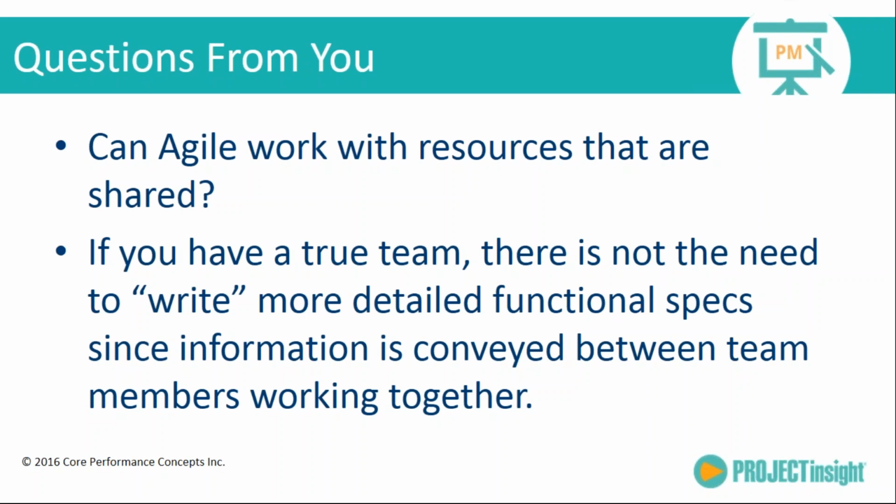it is important to document afterwards when you come up with a solution what that solution was. And there's a couple main reasons for that, because we need to be able to train. So people need to understand how it was actually delivered and developed. And we also need to be able to maintain the system. So if we don't document what was actually the result, then you're going to have some failures that will take much longer to fix from a maintenance standpoint.